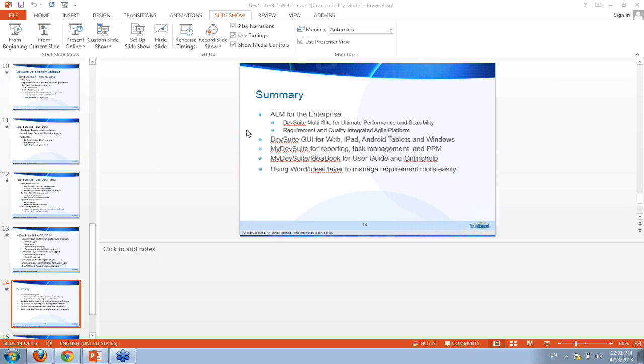Time remaining to me represents the self-driving indicator, meaning time remaining is about a programmer's estimate of how much more time before I will finish the task. It really represents a commitment, a driving fulfillment commitment, so that if you estimate 2 days, you're going to do your best to make sure you can finish the task in 2 days.